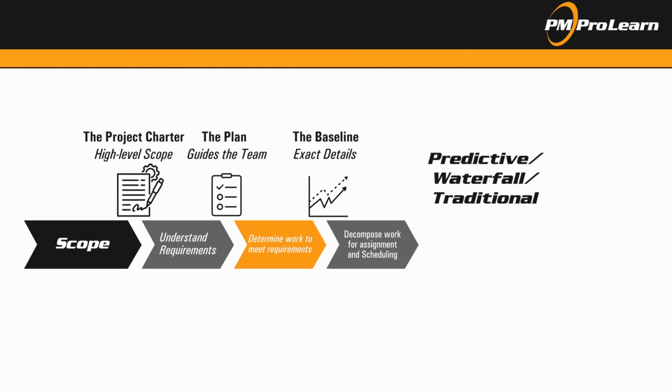You may have heard the terms predictive, waterfall, or traditional. All of these terms relate to a development approach used when requirements are well defined up front. It often uses a work breakdown structure for detailed scope decomposition.